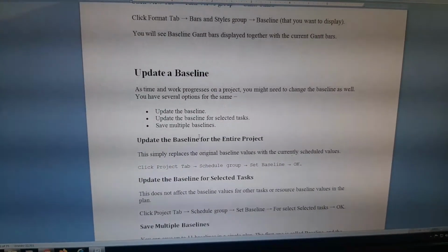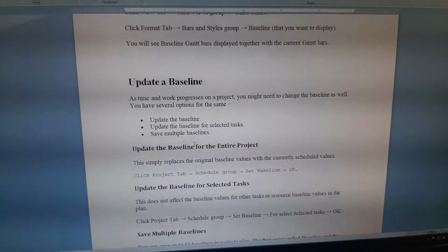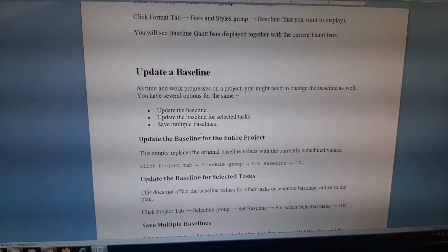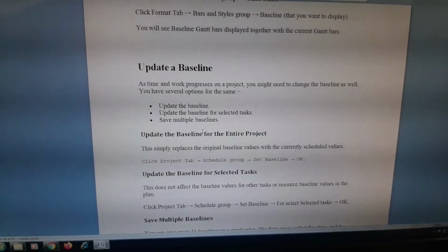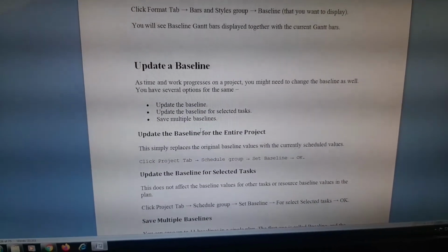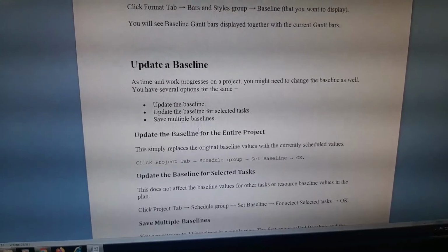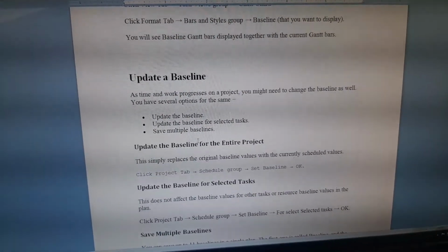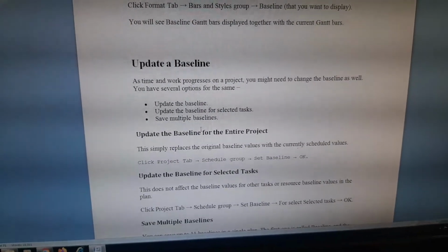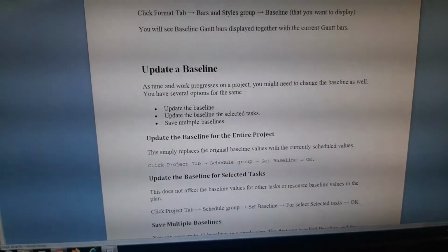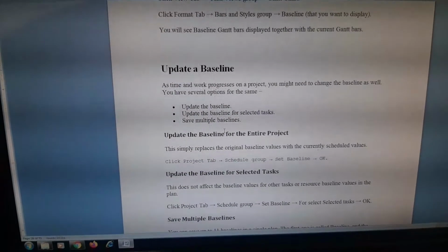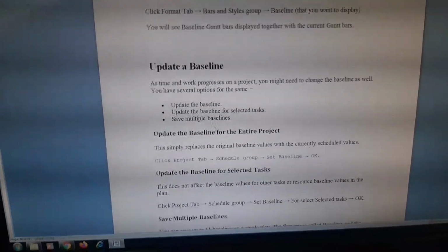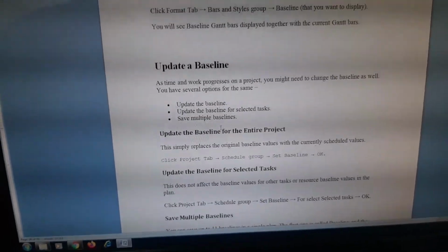From the main office, the baseline schedule will be distributed to the site office. The main office mainly concentrates on the baseline schedule only. The actual schedule depends on the site people. They need to give a reason why they didn't follow or track the baseline schedule. For everything they need to give a reason. But the management mainly concentrates on the baseline schedule only.